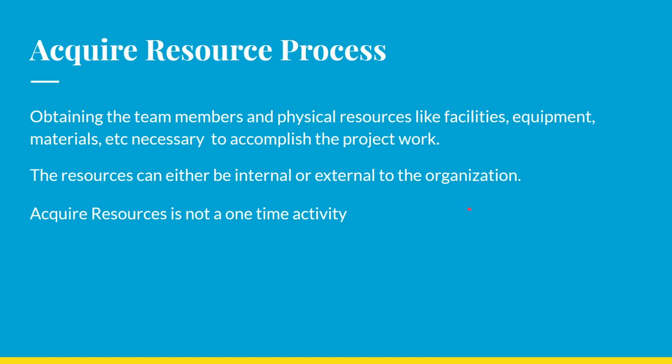Typically, internal resources are assigned by the functional or resource managers, while external resources are acquired or leased through the procurement process. And the acquired resource is not a one-time activity. This needs to be performed periodically as the project needs.